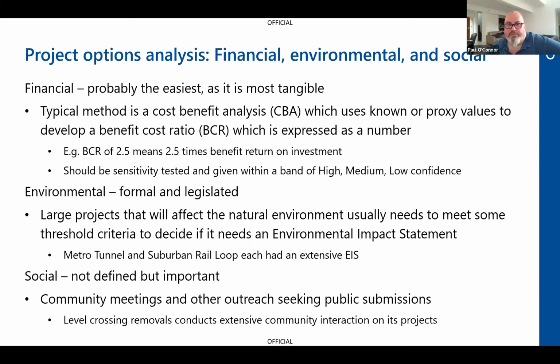And what that does, it uses known values or proxy values. So they take a baseline. So let's say we're going to extend a road or widen a road. We would go out there, we'd measure how much traffic goes through that road. You'd do it over a couple of different times of the day. You'd look at maybe different during the holidays, not during busy periods, and you'd try to get a baseline of how many people use that road. You might also want to understand when congestion is highest,